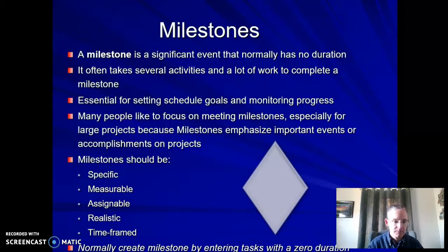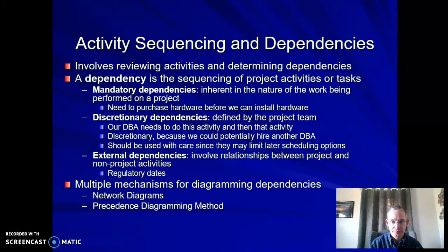Milestones should be specific, measurable, assignable, realistic, and time-framed. Those are the SMART attributes. Obviously, we talk about those in the class, but what you're trying to do with milestones is put things in the schedule that will tell you as you go, are you making the progress that you need to make? So sequencing and dependencies, whether they're for milestones or whether they're just sequencing the tasks among themselves,